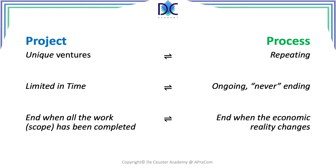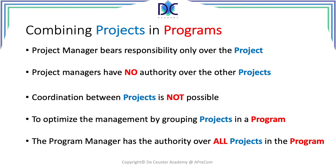But what about projects and programs? In some cases it's interesting to group projects into programs. When we look at projects, the project managers only have responsibilities related to their own projects — they have no authority over other projects and they cannot coordinate between different projects. In order to optimize the management of interlinked projects, they can be combined in a program. In that case, the program manager is responsible for the program and has authority over all the projects in the program.